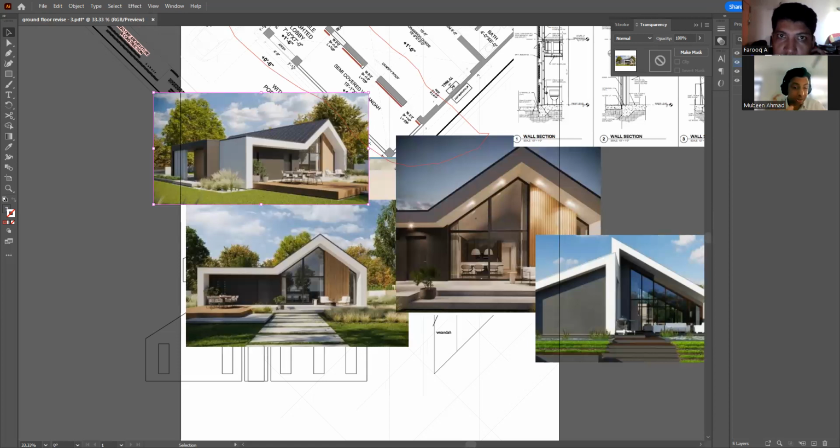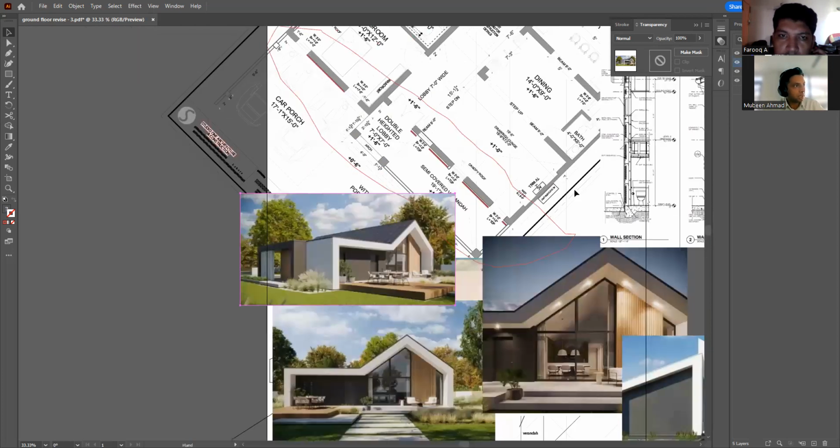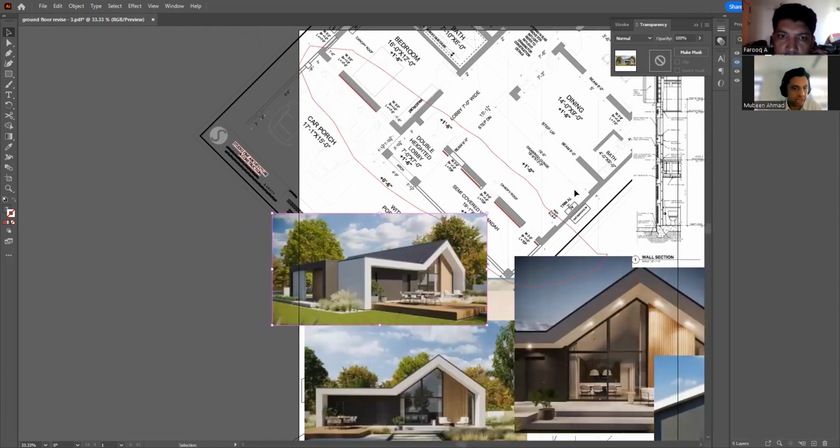So in terms of charges, because we're working on only this portion of it, generally speaking I charge around 500 rupees per square foot, which is a lot. But I'm not going to charge that much because I'm not doing so much design work. So I can do a lump sum for you. Anywhere less than 30,000, because that's what it will cost me as well to do a bit of research and different things. So here's a proposal. How does anywhere between 10 to 20,000 rupees sound to you for all of this? Yes, that's fine.